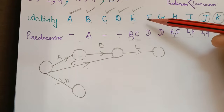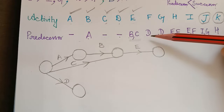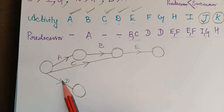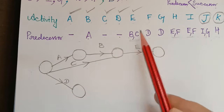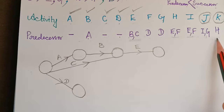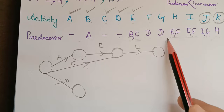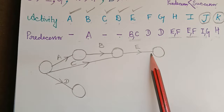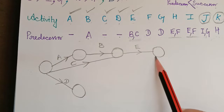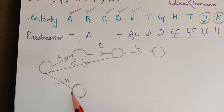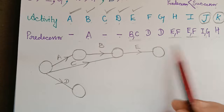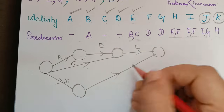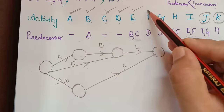For activity F, the predecessor is D, so the starting point is the end node of D. Checking the predecessor list, F appears along with activity E, which has already been constructed. Therefore, the ending node of activity F must be the same as the ending node of E. We draw F from D's end node to E's end node.